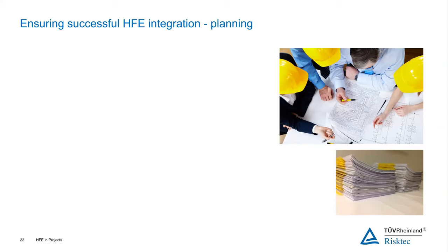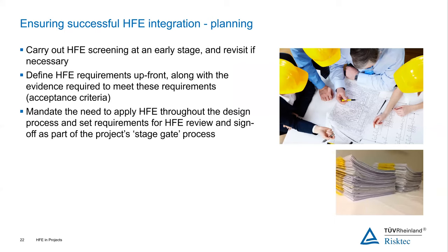So that's the process, but what should we do to make sure that's successful? I've broken this into three slides. And the first is the planning stage. We talked about that screening is absolutely essential. So carry out the screening at an early stage and revisit it if necessary. Define the HFE requirements upfront, along with the evidence required to meet those requirements. So that'd be the acceptance criteria.